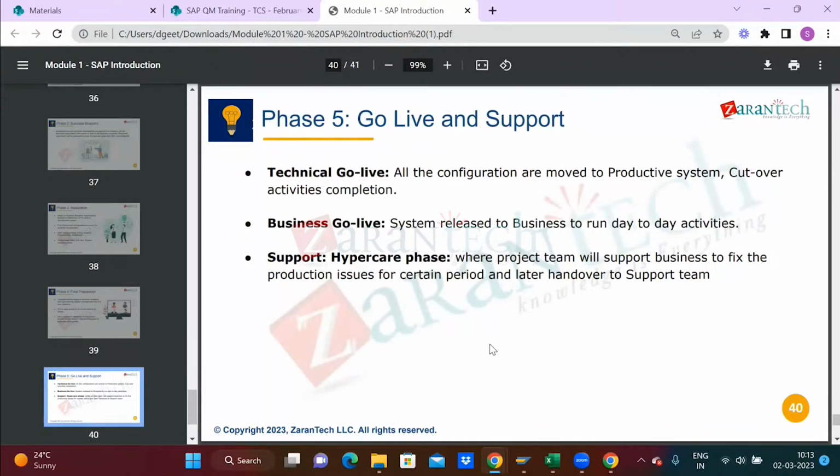It's a sprint approach completely. We will have a deal with the business that within this sprint we'll develop these forms, meaning within 20 days these many forms will be delivered. Once they are delivered, we go to the next sprint. In some cases there are spillovers, due to a communication gap with the business or the complexity of the form, and we are unable to deliver complete forms. One or two forms will spill over to the next sprint, so in the second sprint, instead of 20 forms, we need to deliver 22 forms.